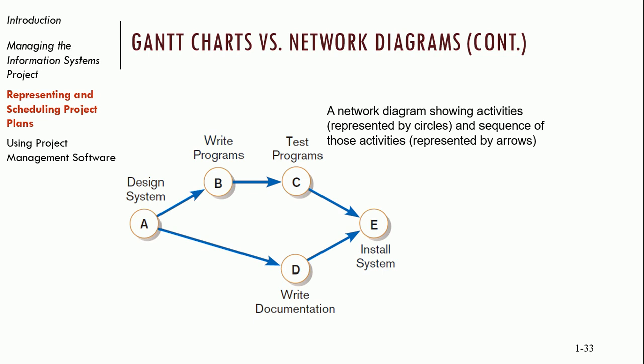Looking at the example on the screen: task A is the system design, task B is writing programs, and task D is writing documentation. Theoretically, B and D could both kick off at the same time. Testing the program cannot start until we've written the program — you can't really test anything until you've written something. So C is dependent on B, which is dependent on A: C cannot start until B completes, and B cannot start until A completes.